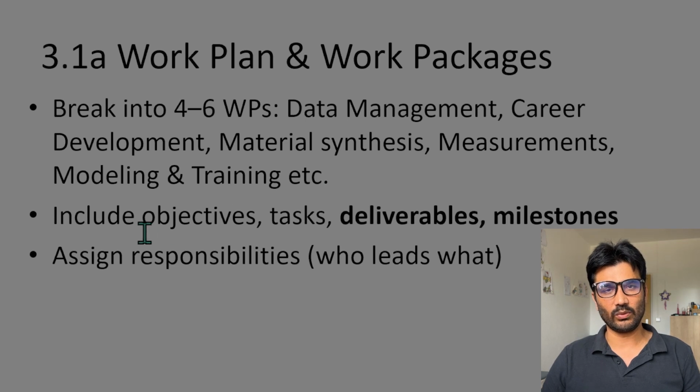For example, you have to include the objectives of each work package. There could be multiple objectives, 3 or 4. Then you have to include the tasks, like what kind of activities you will do here. These should be well detailed again. Then you write the deliverables and milestones.